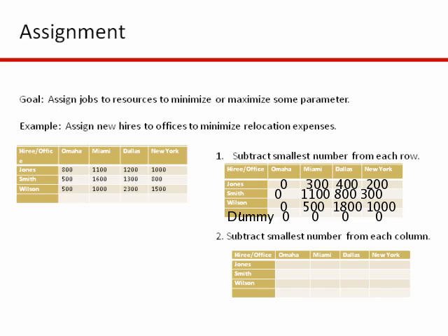Okay. So that's really the first step: we identify the smallest number in each row and we subtract it from all the values in that row. So any questions on step number 1? Okay, step number 2 is we're going to do basically the same thing for the columns.